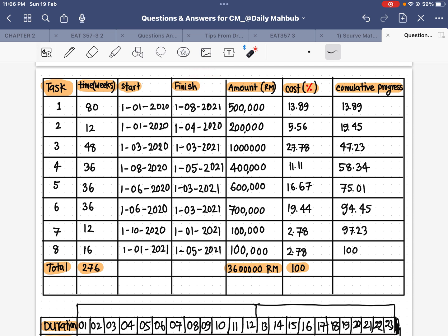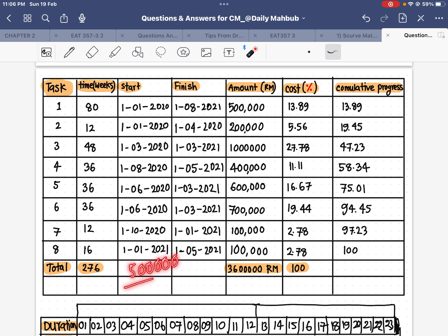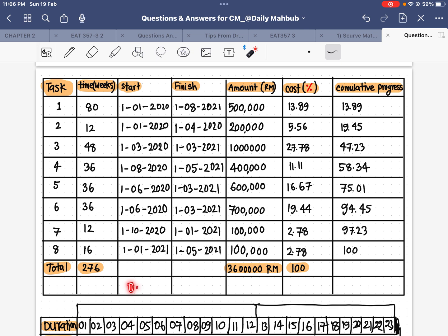The amounts are already given in the questions. I need to find the cost in percentage for each activity. To get the percentage, I take the individual activity cost and divide by the total cost. For example, 500,000 divided by 3,612,345 gives approximately 0.1388, and multiplying by 100 gives 13.89%. In the same way I can find the percentage for each activity.